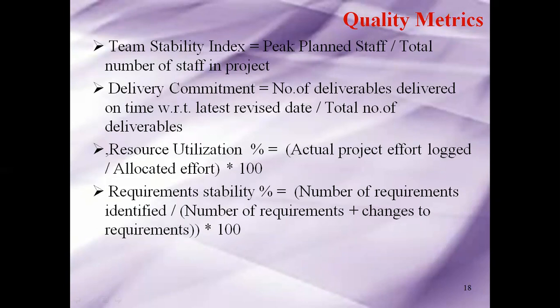All right. So we have completed, say, maybe 3 months on that particular documentation, and maybe I'm already on the 5th or 6th sprint, or if I'm looking at the spiral or sequential methodology, maybe I've finished 3 months of it. Then I noticed that a new set of requirements has got in above the critical mass line. At that point of time, you have to find out the stability for us in terms of how much more documentation I need to do, because scope has changed. That is what I mean by requirement stability.